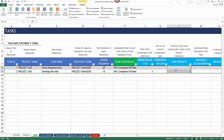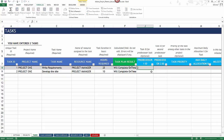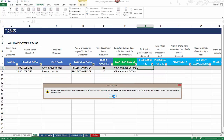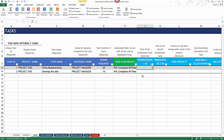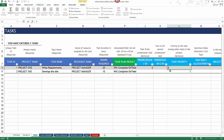Also keep in mind: if you have no task priority values entered, and you set task one to start only after task two completes, a circular reference occurs because task two is listed second and is therefore assumed lower priority — conflicting with its predecessor role. Fix this by explicitly setting task two as priority one and task one as priority two. Priority and dependency must not conflict.